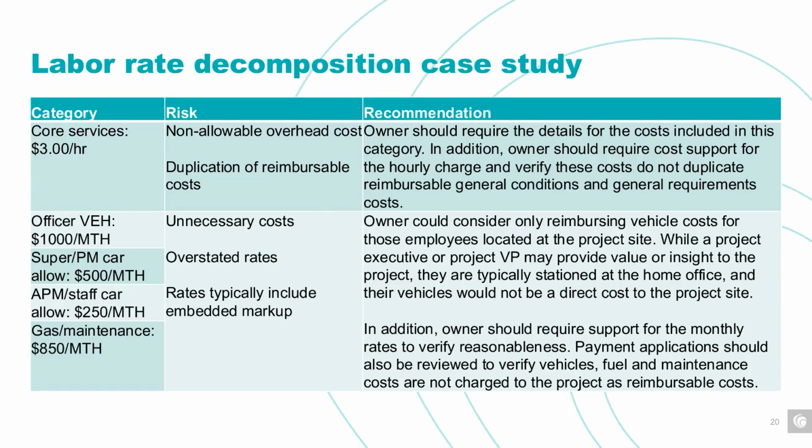And then we move into, this particular contractor had included a lot of vehicles in their reimbursable rates. Now, they did break it down by the level of employee, but then that begs the question itself. So on a project, you should expect to pay for vehicles for folks that are on site on a daily basis, right? This is your superintendent, your project manager, maybe there's an assistant project manager or multiple individuals that are on that site every day. So it's reasonable to expect to pay vehicle costs, right? Therefore, again, though, we want to make sure we understand how that's being charged to the project so we don't potentially pay these costs twice.